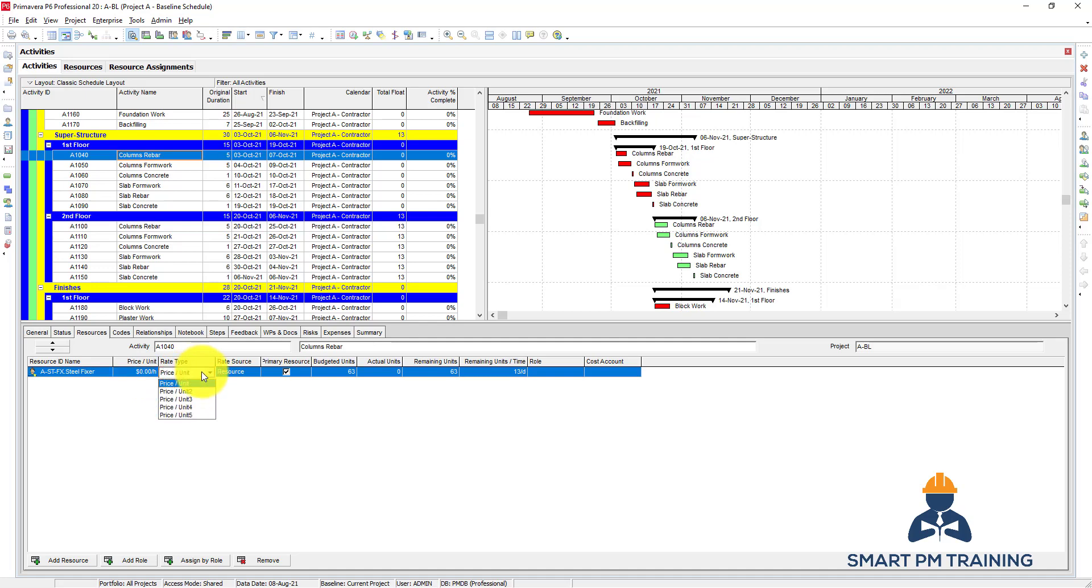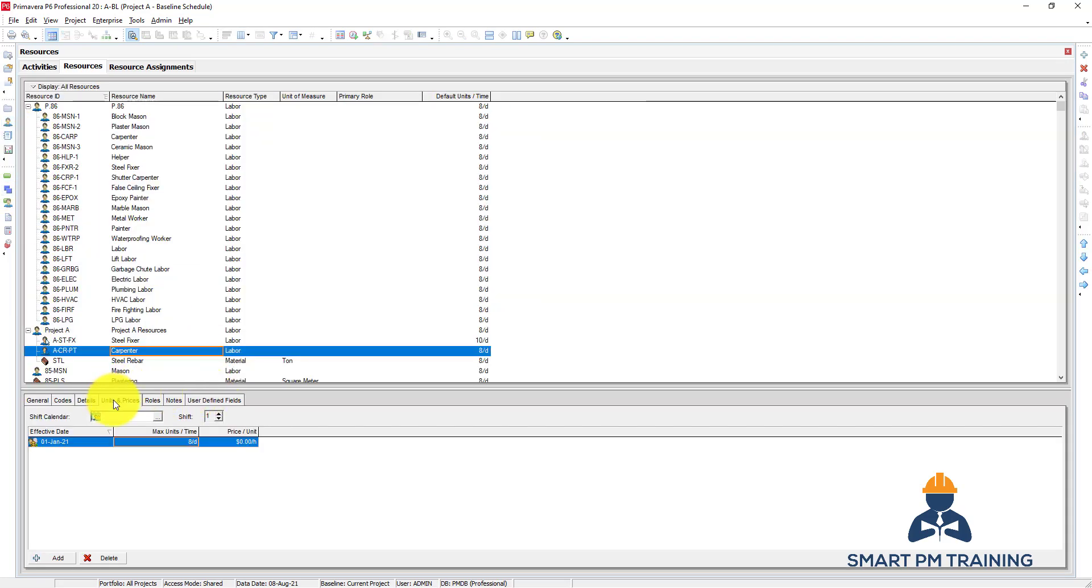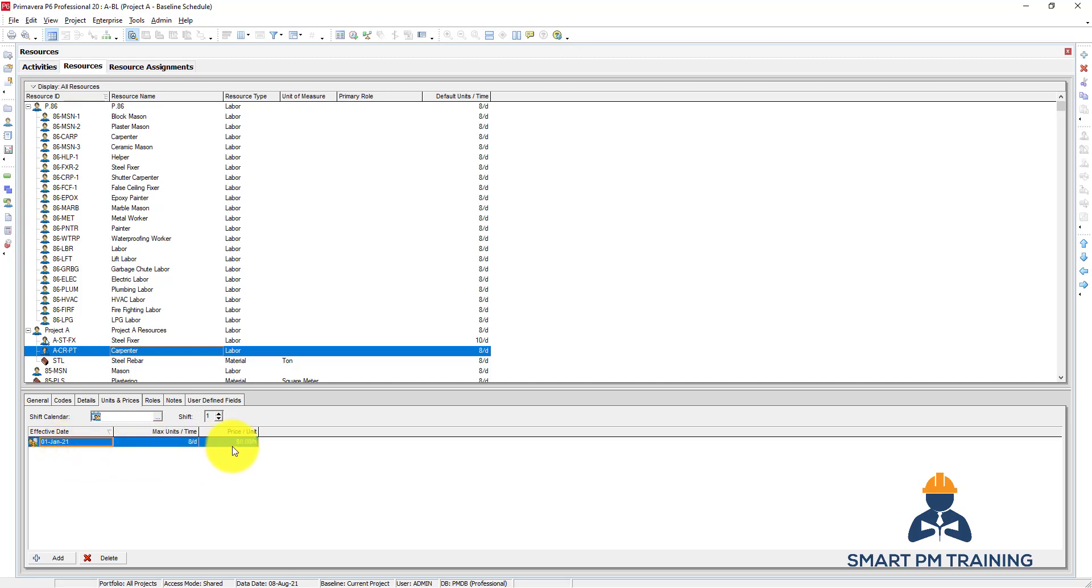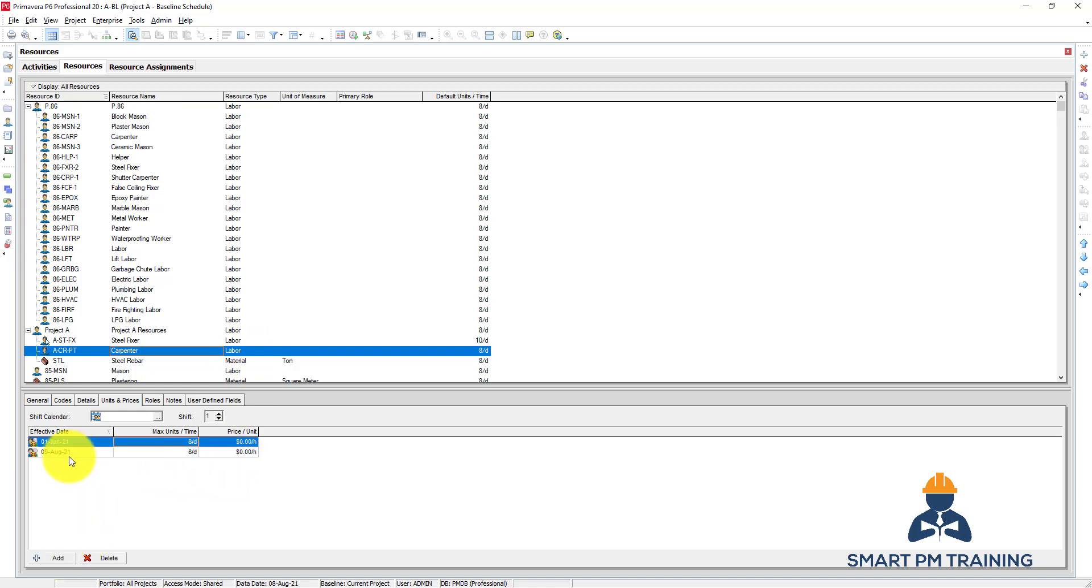Rate type is price per unit by default, and you can have different rates. If you go to resources, you have under the units and prices - this is effective date for this price per unit or the maximum units per time. From first of January, I have maybe $12 per hour, and maybe by October the same year I will hire a new subcontractor, so the same resource will have higher hourly price. You can always add effective dates and different criteria, and Primavera will detect that accordingly and update your usage profile.